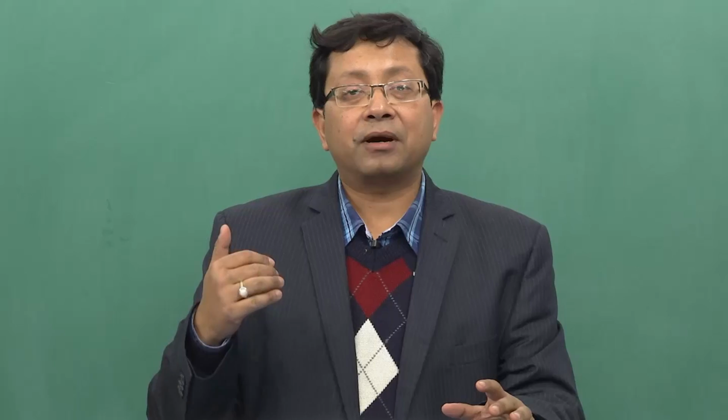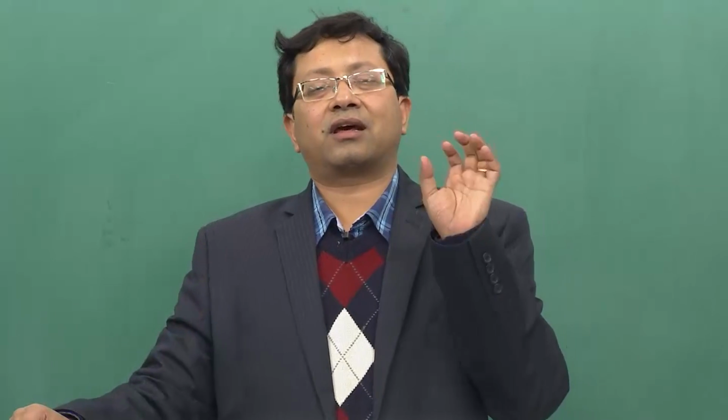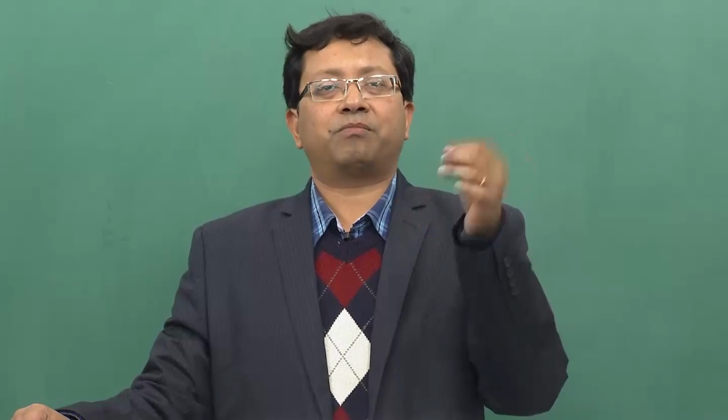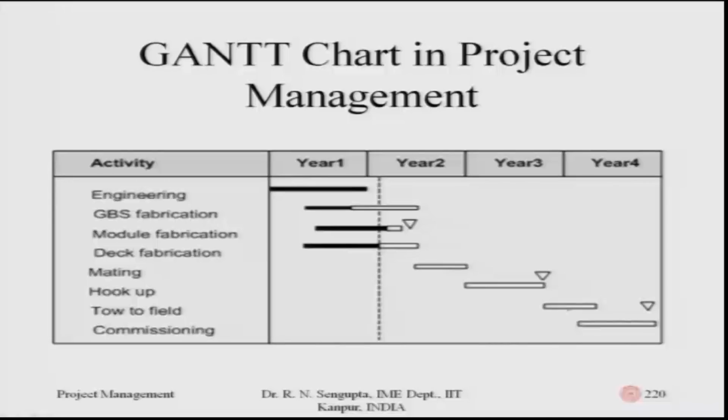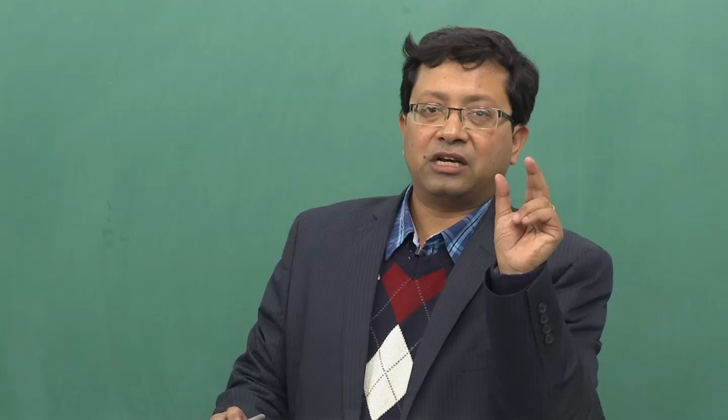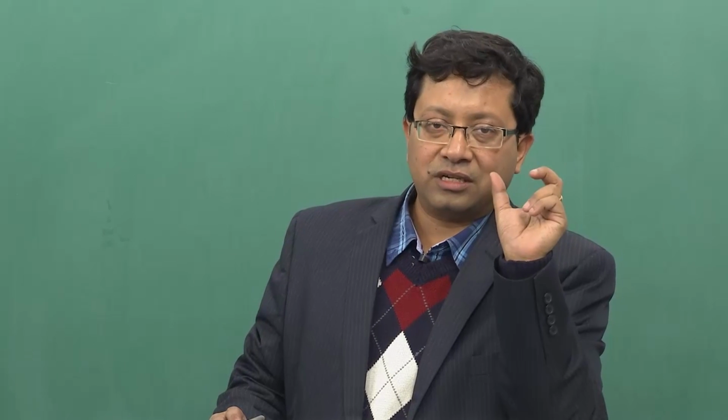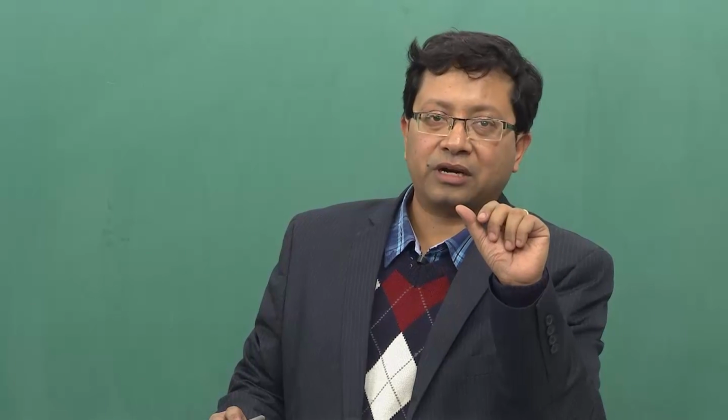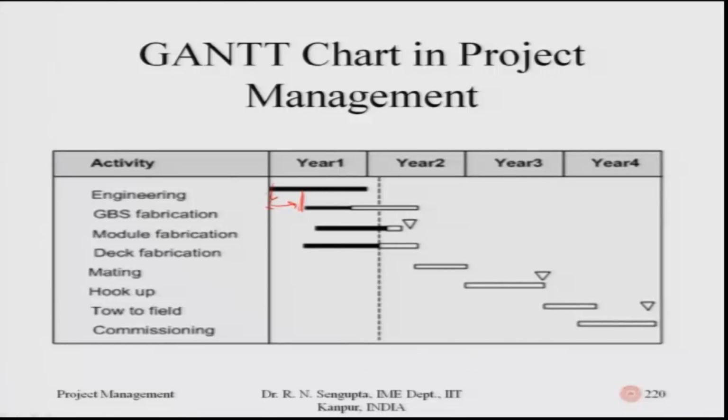Obviously, that is true, but it need not start at the end when the overall engineering work is finished, because there are 3 important parts of the overall project: part 1, part 2, part 3. The moment the overall design of part 1 is finished, the fabrication work for part 1 can start. So, that is not a delay, I should not use the word delay, it is basically the leeway we should give, considering once the design part is over, then only the fabrication part can start, say for example given by time t1.